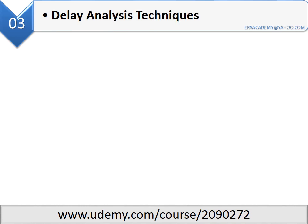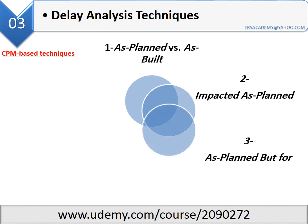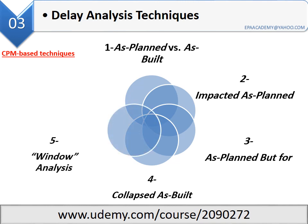The third station is delay analysis techniques. The techniques can be grouped under a static group — techniques not based on the critical path method — and a dynamic group of CPM-based techniques. The CPM-based techniques are: one, as-planned versus as-built; two, impacted as-planned; three, as-planned but-for; four, collapsed as-built; five, window analysis; six, time impact analysis.